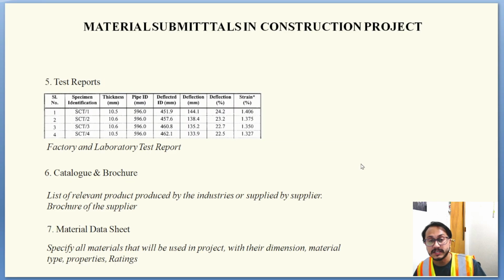The fifth one is the test report. You need to include the test report from the factory test or the tests done in different laboratories. Those test reports have to be included in your material submittal for each individual material.